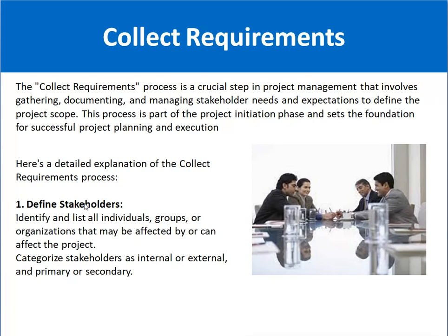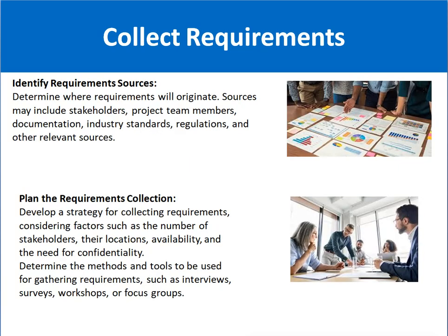These can be primary or secondary as well. For example, the primary stakeholder for your side is the project manager from the customer side, and the secondary is, for example, the coordinator from the customer side, etc. So you have to identify the stakeholders, the persons who have an interest or stake in the project, first thing. Then identify the requirement sources.